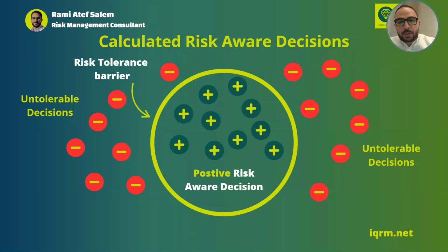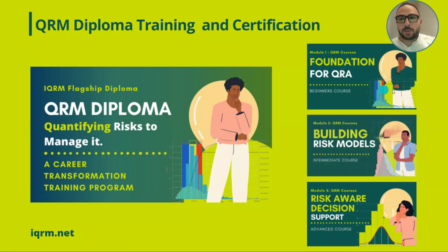And also there is maybe hedging of currency. For example, your contract is in euro and you are importing material and equipment in USD, so there is the currency exchange rate. So is hedging the price a good decision or not? There are a lot of things, even in personal life. Is changing my job from my current job to another job a good decision or not? Make sure that you are understanding the main concepts.